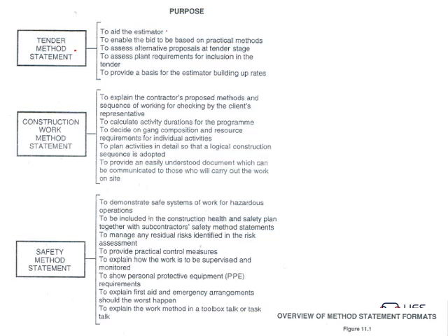It enables the bid to be based on practical methods and to assess alternative proposals at the tender stage, assess the plant requirements for inclusion in the tender, to provide a basis for the tender estimator. So this is very important. Why you use method statements? Bernard, you asked, I think, why the method statements are used or when. So this is basically why we have it.